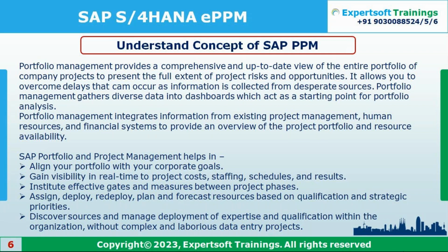All these projects, that is called project management, and this is your portfolio management. It is tightly integrated with these decision points and the gates. Each and every gate has particular stakeholders. Each and every stakeholder has to approve it, then only can you proceed to the next level of gate. So according to that you can assign, deploy or redeploy your plan.